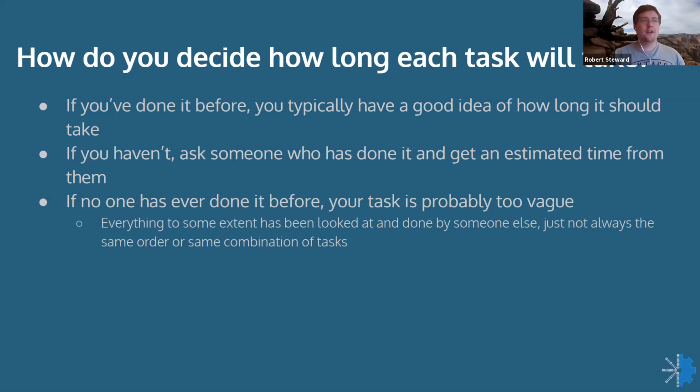Basically, if I ask someone who's a professional welder how long it takes to weld a specific object, and they say, oh, it takes me about an hour, it's not going to take you an hour if you've never welded before. It's going to take you quite a bit longer. So actually being able to account for that is important. I think we have a little rule of thumb in a couple slides from now. If we don't, then I'll bring it up in a little bit.